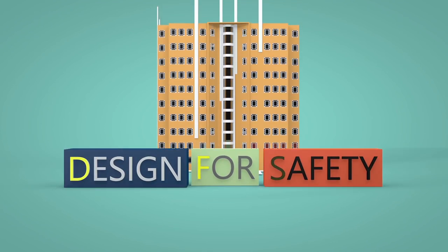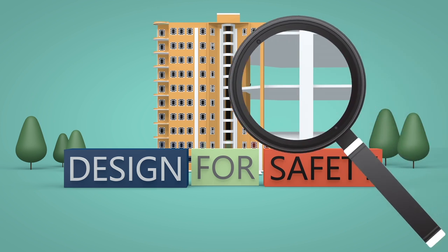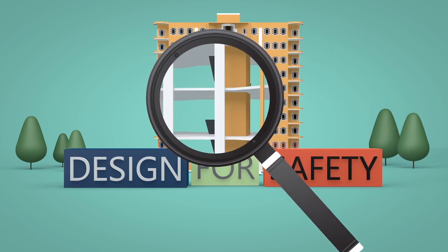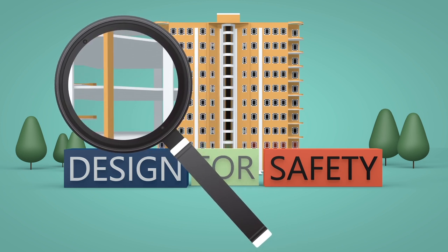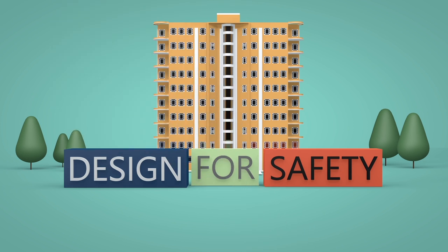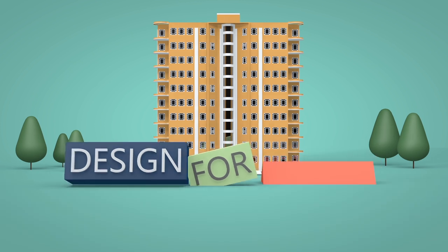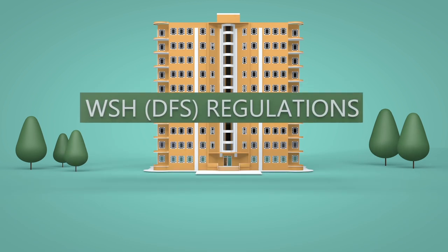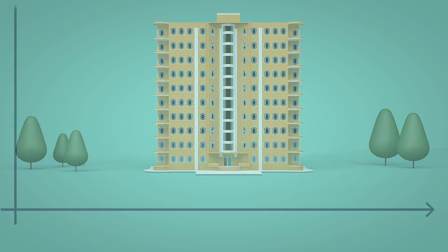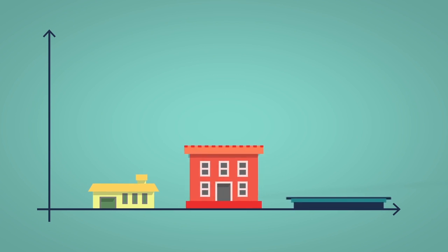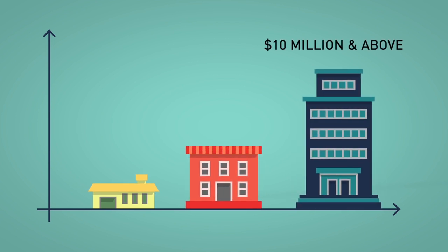Design for Safety, or DFS in short, is the process of identifying and reducing safety and health risks through good design at the conceptual and planning phases of a project. Through early intervention, risks can be mitigated before construction and maintenance. The WSH DFS regulations is effective from 1st August 2016 and is applicable for all construction development with contract sum of $10 million and above.